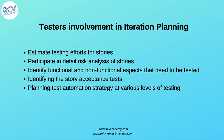Testers participate in detailed risk analysis of the stories and identify functional and non-functional aspects that need to be tested. Depending on what stories are being picked up in the sprint, testers define the functional and non-functional testing required for each story. Testers also identify the story acceptance tests based on the acceptance criteria defined in the user story, and raise any gaps in that acceptance criteria.